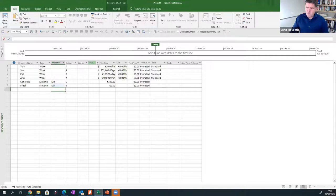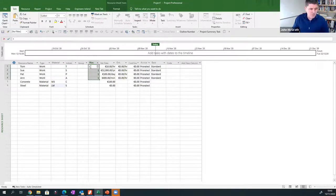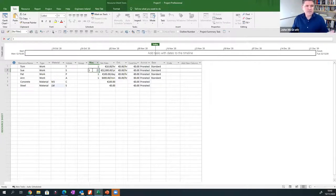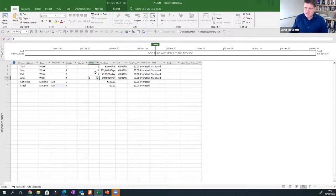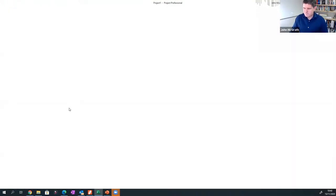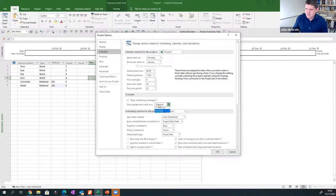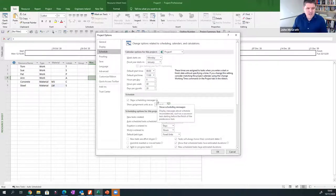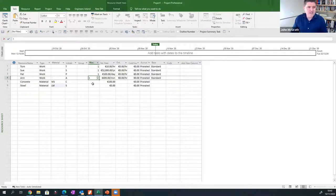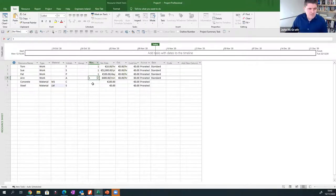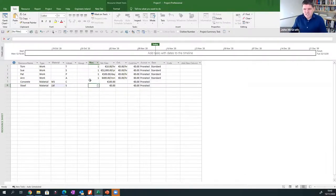Underneath the people I'm going to put in Concrete as a material resource with label M3, rate of 100. I'll also put in Steel as a material with label LM for linear meter. In a lot of infrastructure projects I work on, we talk about needing two machines — not 200%. The default in Project is to express resources as percentages; I think that's messy in reports. You can change to decimals by going to File, Options, Schedule, and changing Show Assignments Units from percentage to decimal. I've never heard somebody say 'I need 500% of general operatives next week' — we'd say we need five.